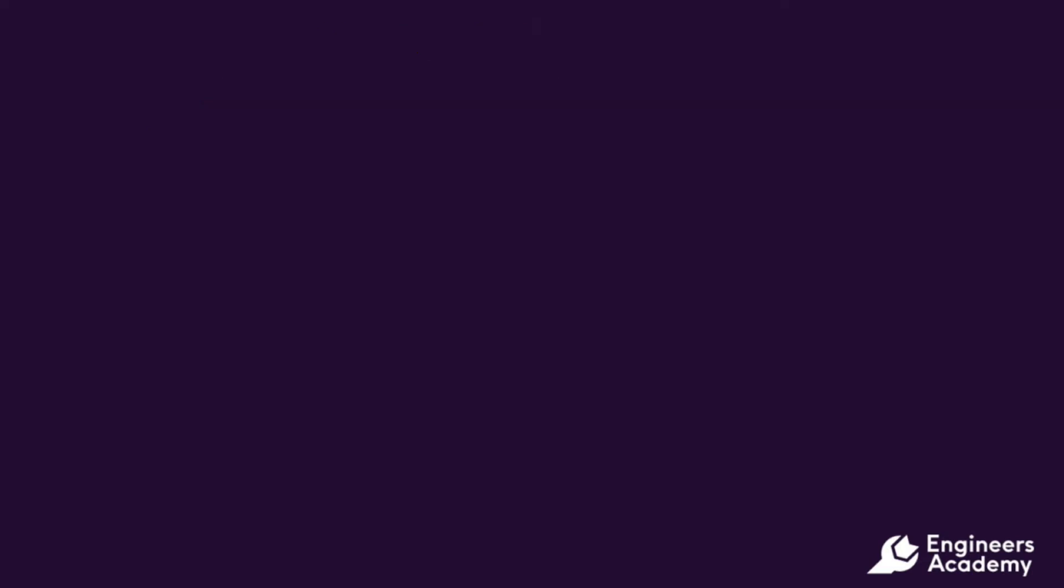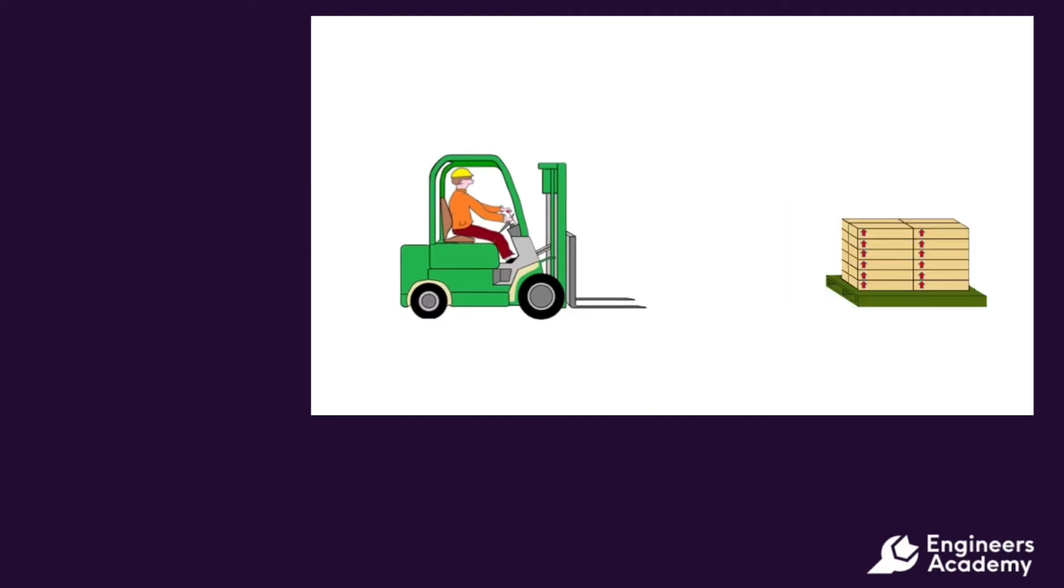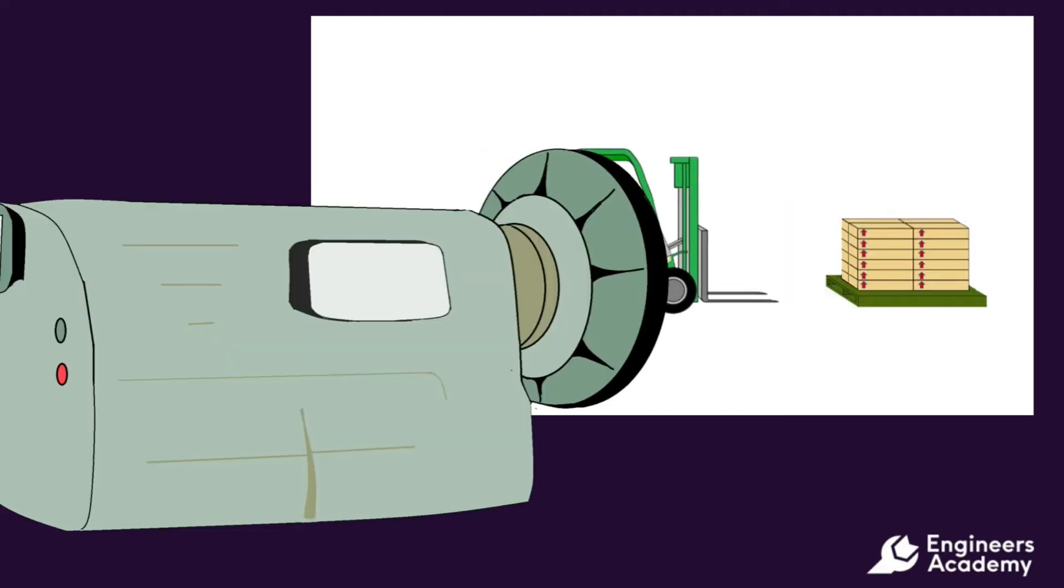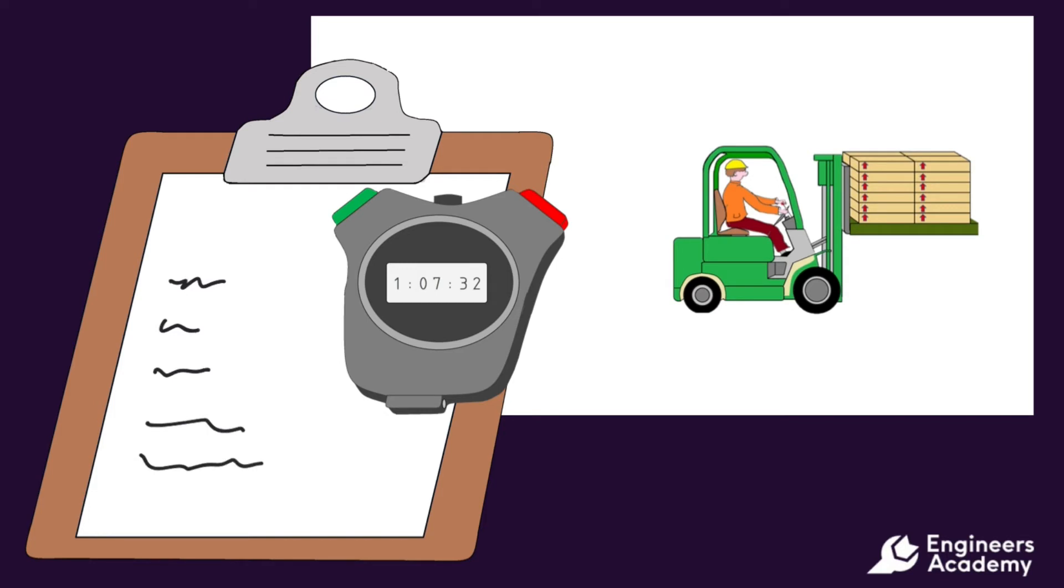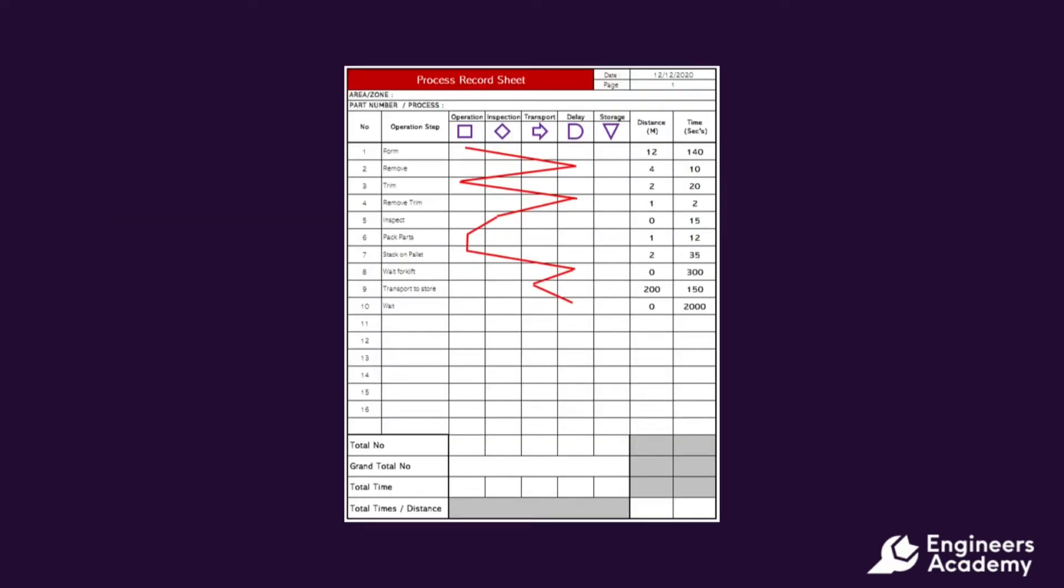It is essential that the team observe the process firsthand. The team go to the shop floor and video or manually record the process. From the data gathered there is a list made of all the steps, finding the natural breakpoints in the process.